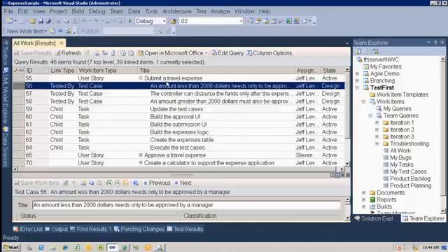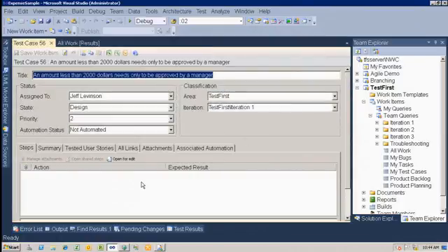I've got my test cases, and the test cases don't actually have anything in them. There's no test steps there. It's just the title. But the title of this is testable. It's what we call an acceptance criteria. Under which criteria will you accept this particular story? How many of you create acceptance criteria before you start working?